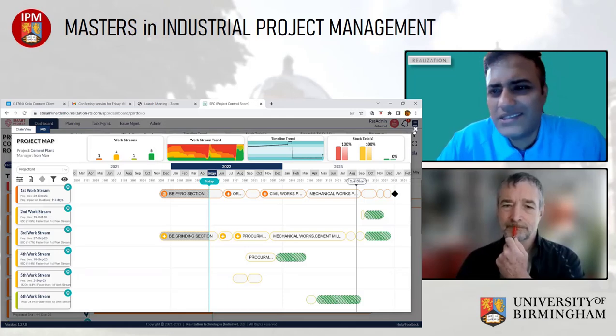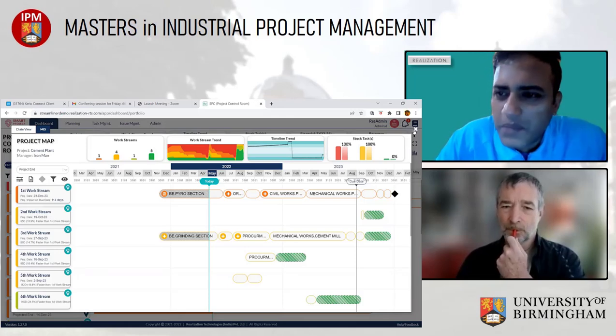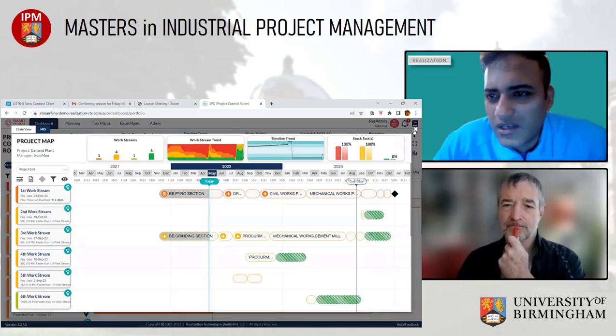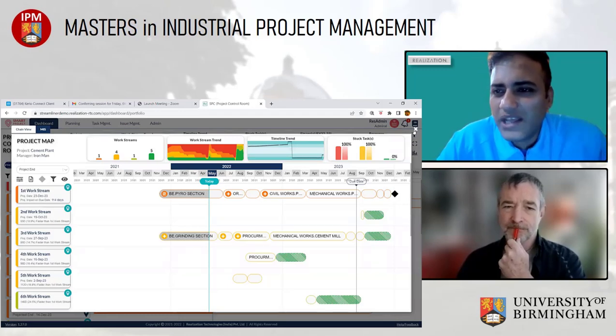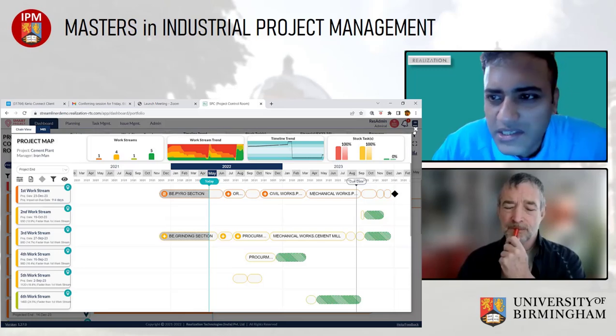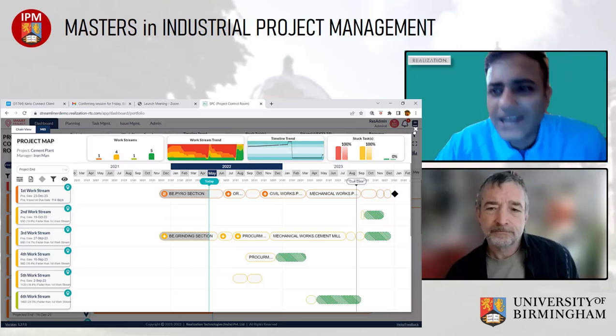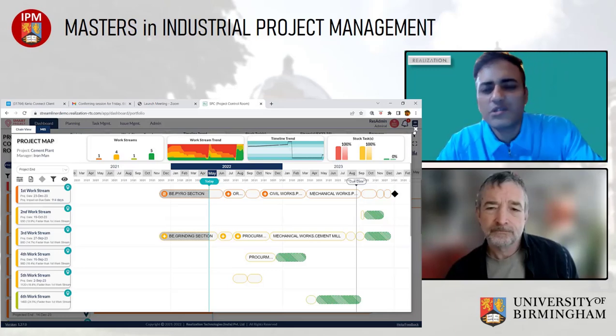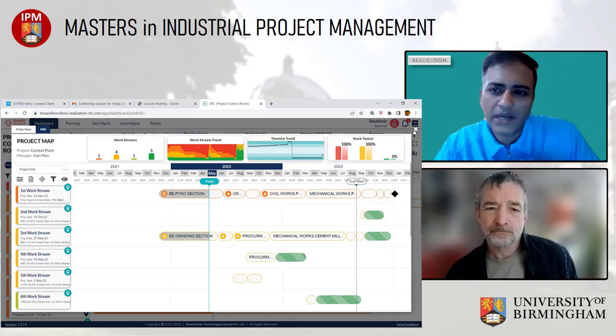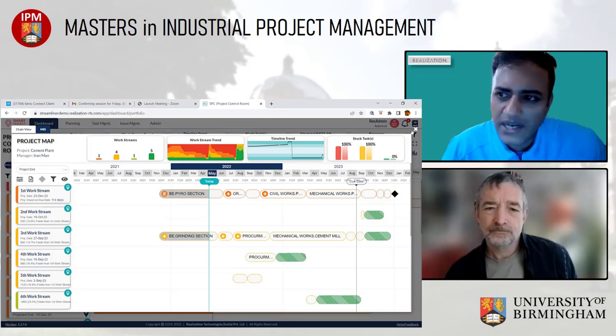So if it is in a small range, it's not a problem. But if it is huge, that your top priority tasks as a rule or as a convention tend to take way longer than planned for, then probably resource concentration is not happening or issue resolution is not happening in your area. So that is a cause of concern. So the system also provides you feedback at an organizational level on how you are following the basic logic.